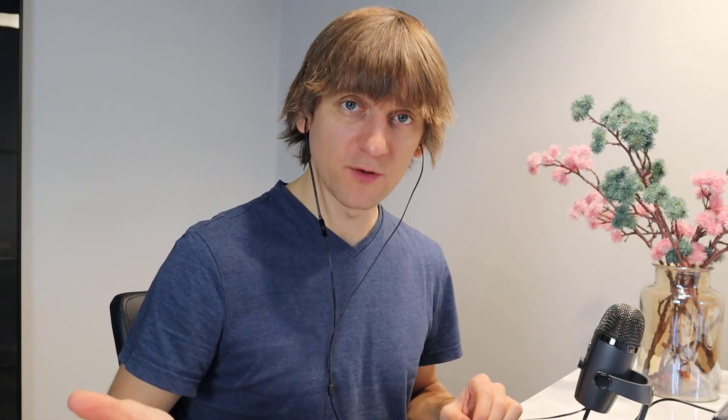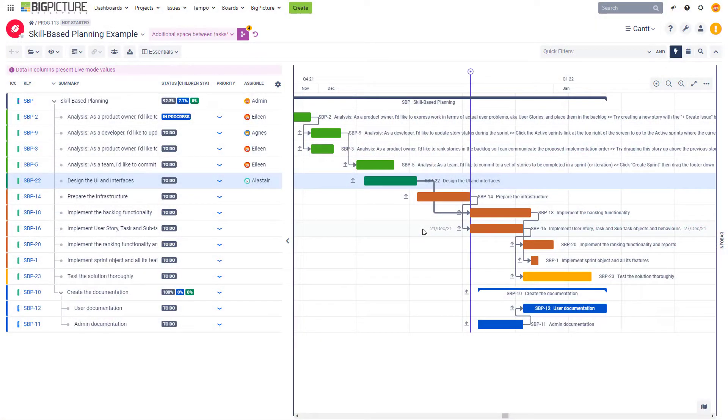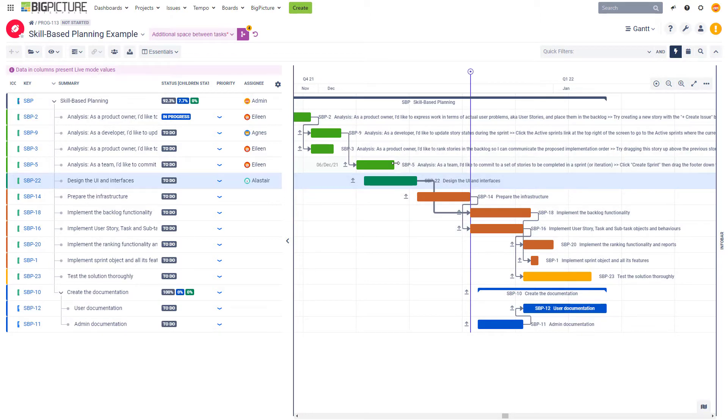What, for example, would happen if you'd like to create a new dependency between your tasks? Is that possible? Unfortunately, not really. You can hover your mouse over here and you don't see this pointy element appear allowing me to grab the task and create a dependency connection. So that's one thing that's definitely missing still from the what-if scenarios.